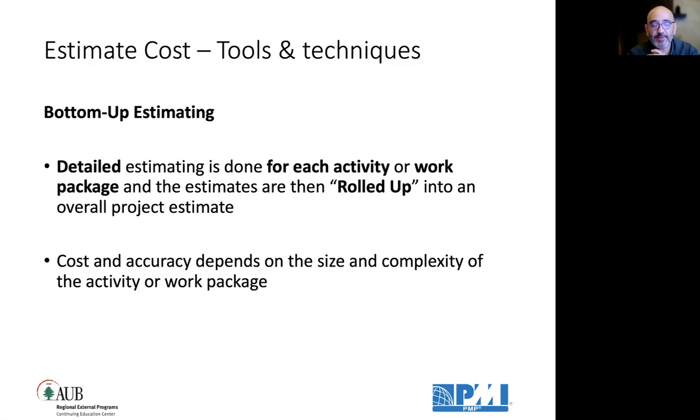You don't have to use only one estimating technique, you can use a mix. So for this component, I use analogous estimating; for this component, it's critical, so let me go deep and do a bottom-up estimating technique.